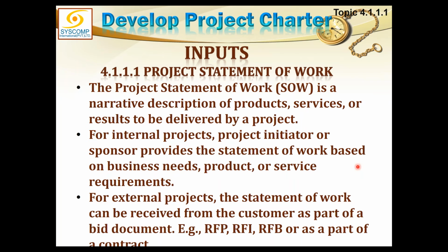Normally, when you get the procurement documents, which are like RFP, RFI, RFQ, whatever, those documents will contain the brief statement of work. But remember that even before the procurement documents were created, the statement of work was created first. And only based on that statement of work, these detailed requests for proposals and all that were created. And naturally, once I am providing the request for proposal to my bidders, then I am explaining what I want, so I am including the statement of work in that as well.